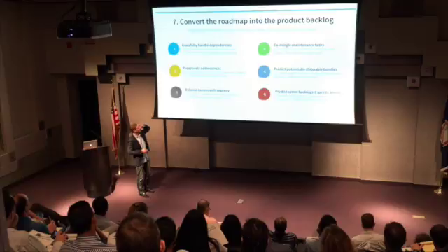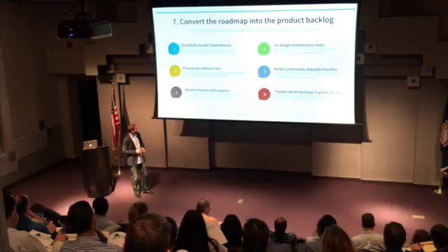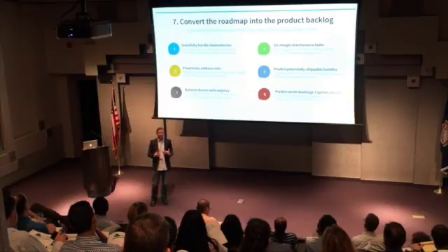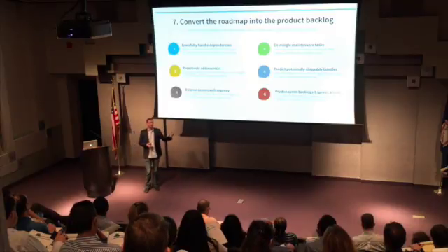Those are the kinds of things that engineering can help with, that UX can help with, and sometimes the business side can help with as well. Proactively address the risks. This could be thinking about risk from a lean perspective: what are the business assumptions and user assumptions baked into this that we should go test up front? Or it could be assumptions about technology, that we can use a certain kind of technology, or that a certain kind of API integration will be easy to do.